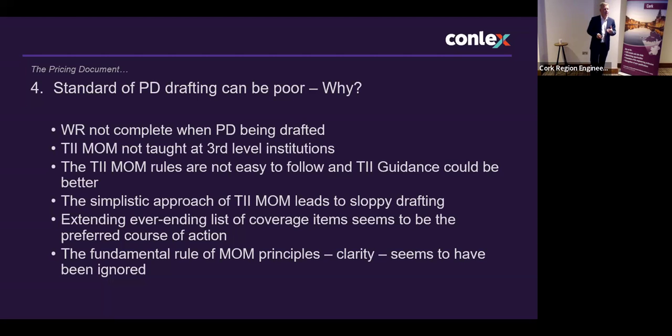And I mean, the fundamental principle of a method of measurement, or a pricing document for that matter, what is it? What are we trying to do with a pricing document? What's the purpose of the method of measurement? It is to provide clarity, going back to that level playing field for tenderers, so that they can look at the pricing document, and when they're pricing, they can see a description and relate that description back to the drawing and specification, and look at the method of measurement and the coverage items, and know exactly what they have to price.